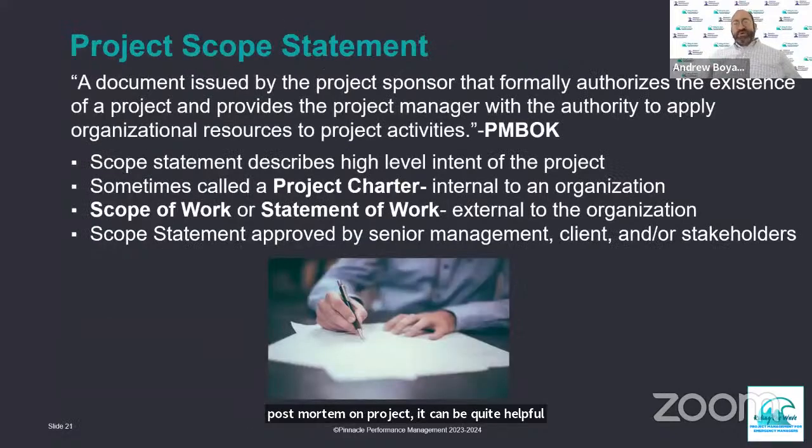So as I explained before, what's a project scope statement? It's a document issued by the project sponsor that formally authorizes the existence of a project, and it provides the project manager with the authority to begin applying organizational resources, which may also include budget, to the project activities. That's a classic definition from the Project Management Body of Knowledge, also known as the PMBOK. A scope statement describes the high-level intent. Sometimes within an organization, it might be referred to as a project charter. If it's used as part of a bidding process, it might be called a scope of work or a statement of work.